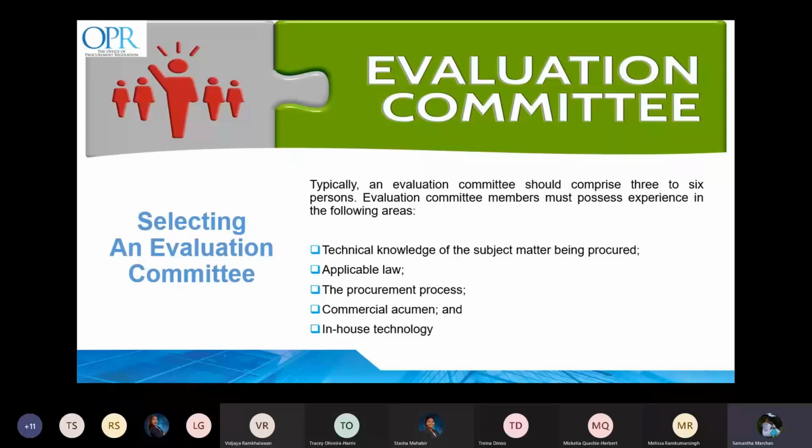Selecting an odd number of members may be helpful depending on the evaluation situation and method utilized. The members should be present for the entire evaluation period and should be involved in reviewing all proposals. The evaluation committee shall establish its operational rules for the evaluation procedure, including regulating the expected presence of the members, power of the chairman, and time schedule of the evaluation process.